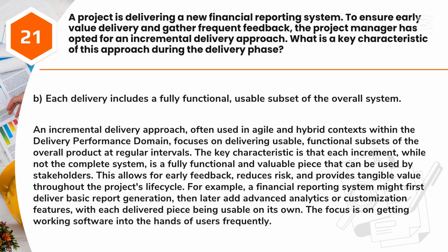The key characteristic is that each increment, while not the complete system, is a fully functional and valuable piece that can be used by stakeholders. This allows for early feedback, reduces risk, and provides tangible value throughout the project's lifecycle.